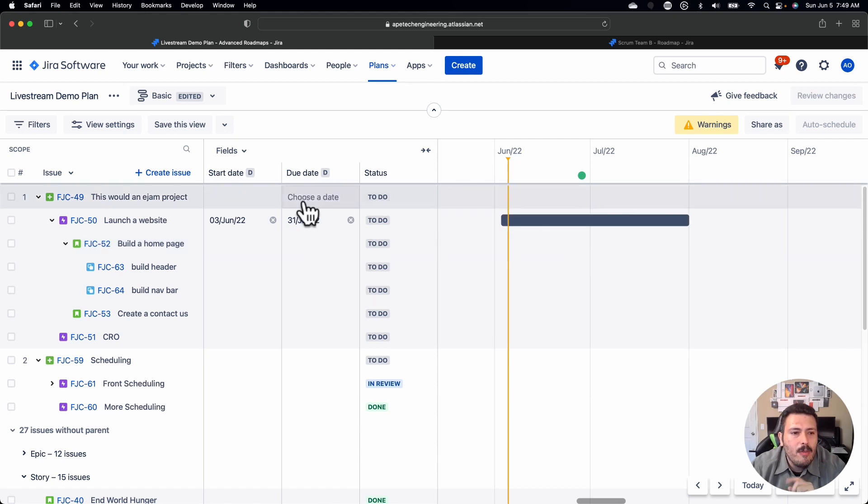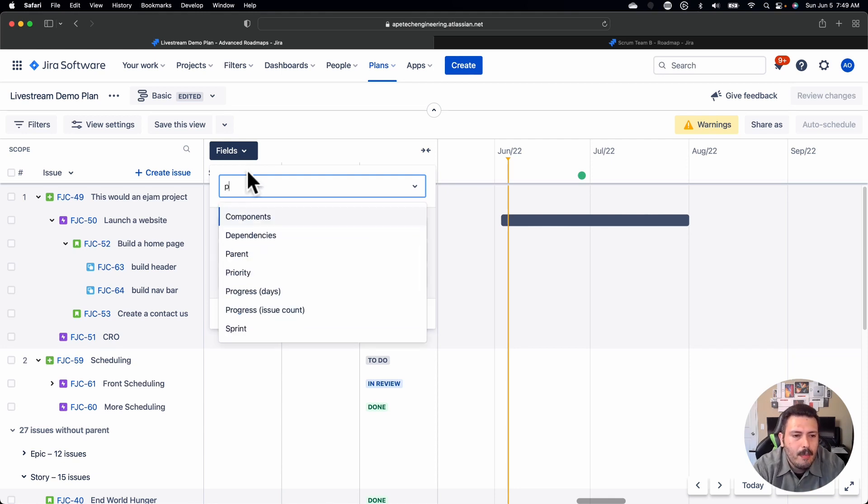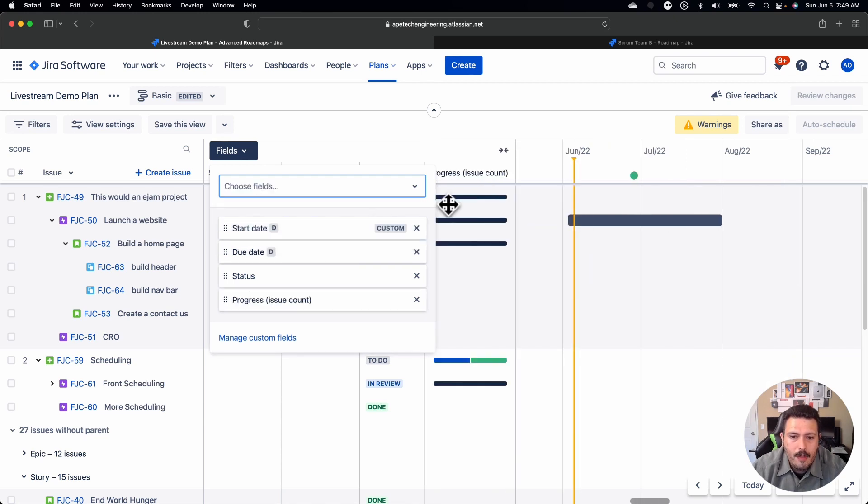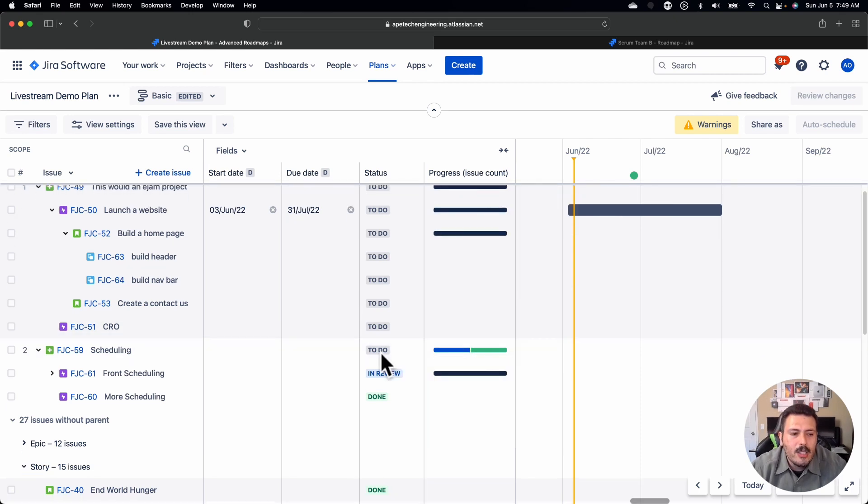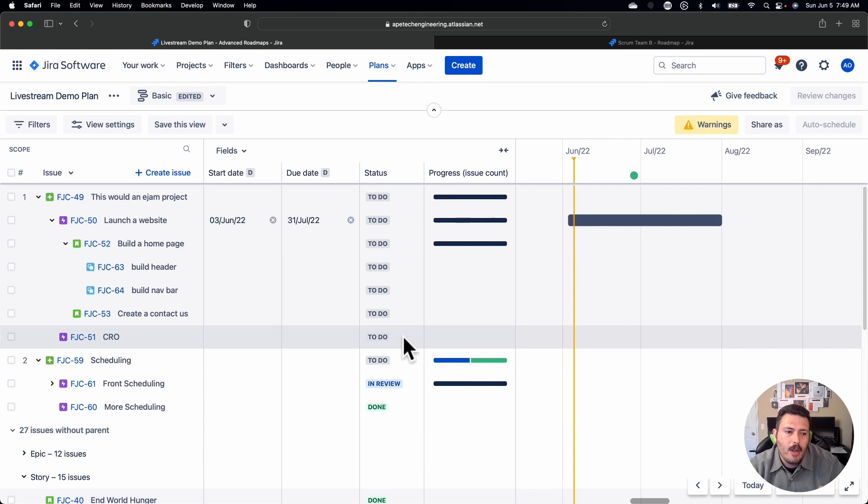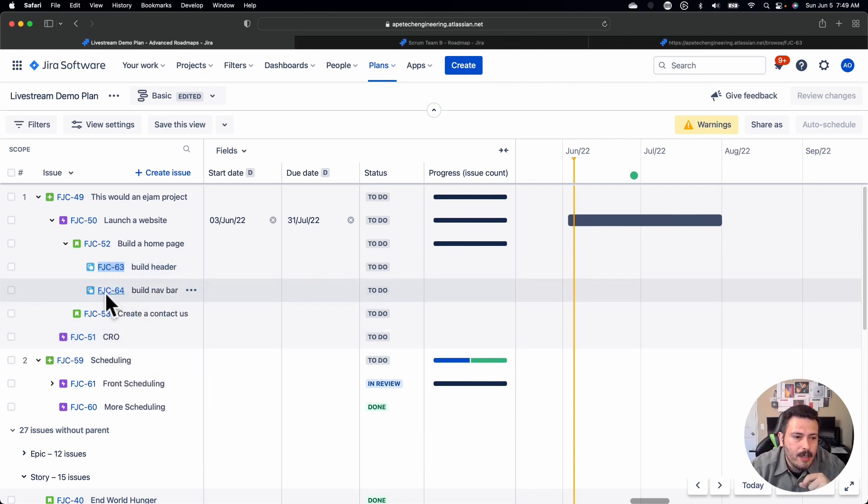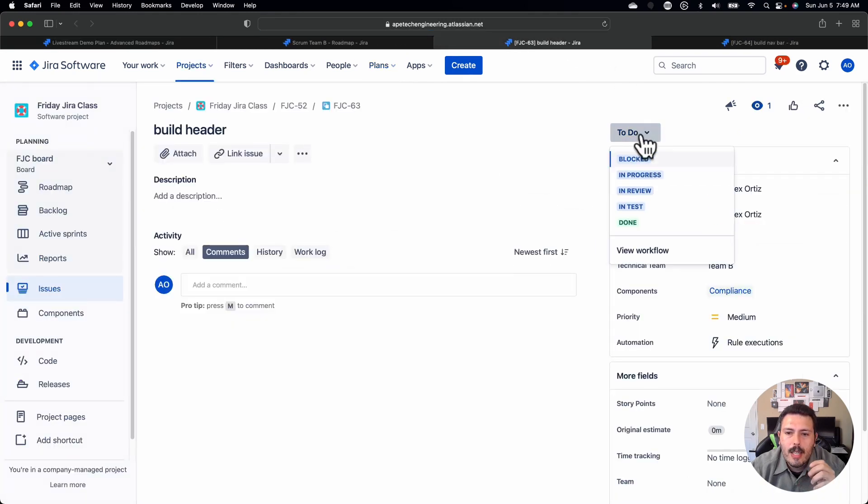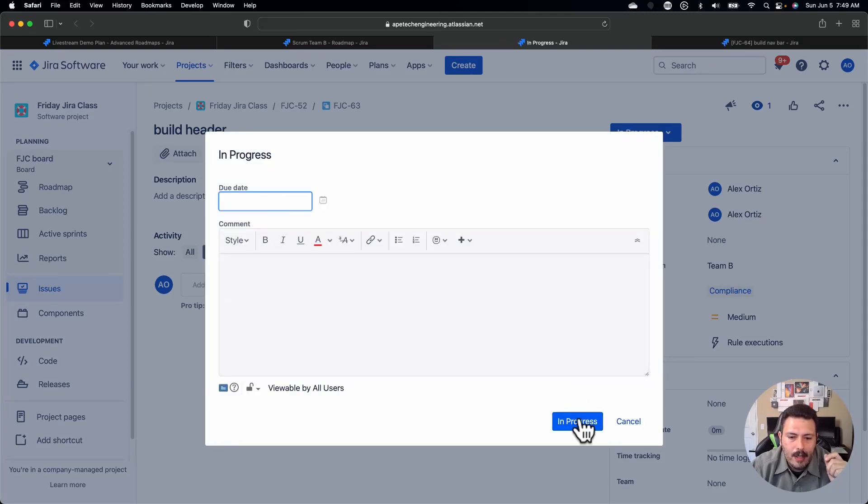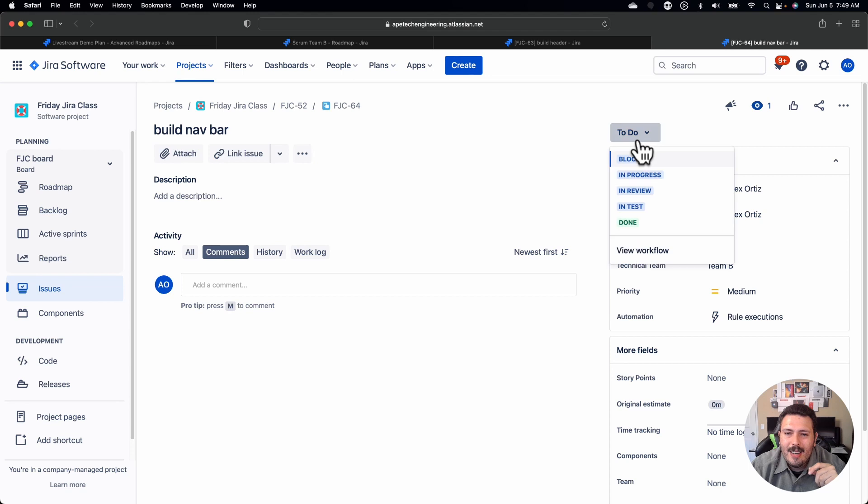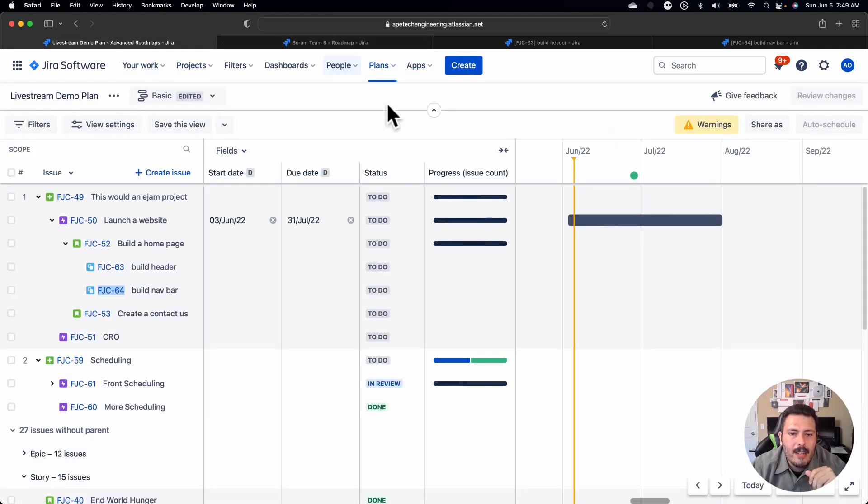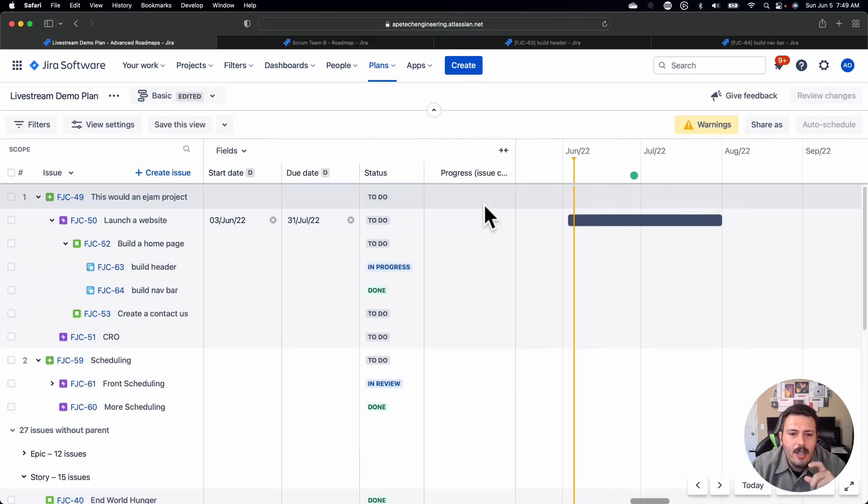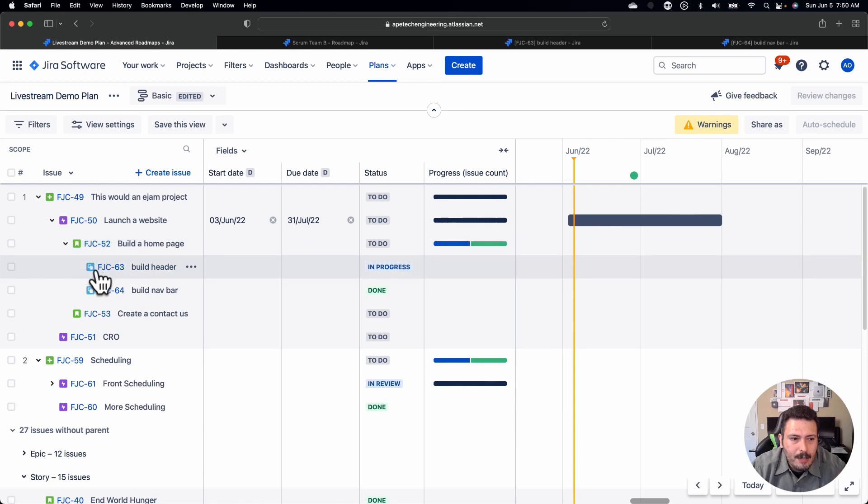And for the final feature, one of these cool things that I really want to show you is under fields in the advanced roadmap, if you type in progress, you will get an issue count progress. If you add that in, you will then get another column here that essentially rolls up the progress of all the children below it. So whenever any of the children get updated, I'm just going to update these two subtasks here, when those children get updated to let's just say one's in progress and let's just say one goes from progress and one is done.